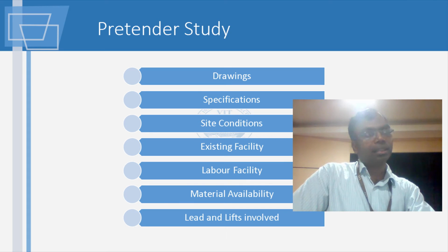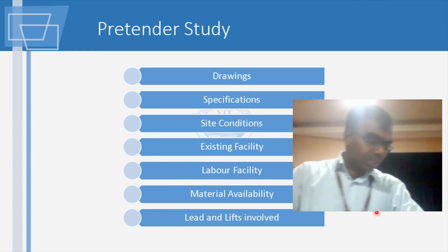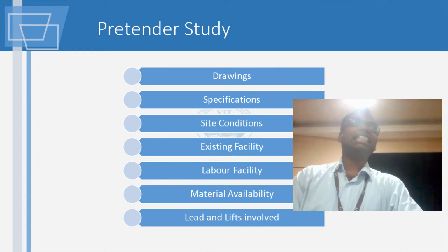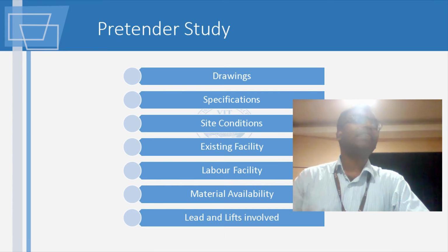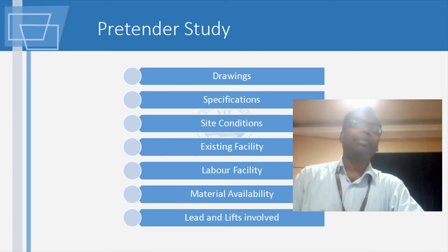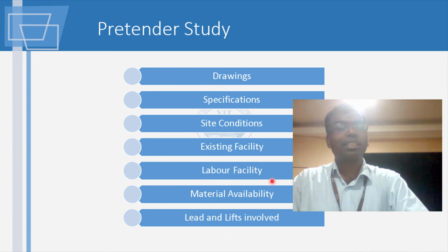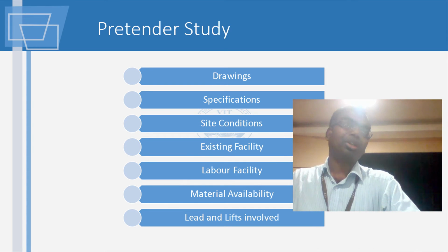Yes, yes. That is called FEED. FEED is a term which I don't think is used in India. FEED is front end engineering design. At Saipem, we used to do a lot of FEED work. It means if some sheikh has an oil field, he knows oil is there, but he doesn't have any technical knowledge. So he'll come to Saipem. We will do all this. We will give drawings. We will give specifications based on site condition, existing facility, everything we'll take into account. It will be so good that you can probably even do the drawings.